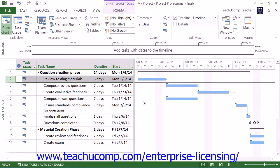Note that you are not required to assign resources to tasks. There are some tasks whose duration cannot be reduced by assigning additional resources. However, for most tasks, effort-driven scheduling allows you to know when a work resource is supposed to be working and on what tasks they should be working. It can also prevent over-scheduling of your available work resources — for example, preventing too many tasks from being assigned to a single work resource. It also allows you to track the costs associated with a resource as it completes the task in the project.